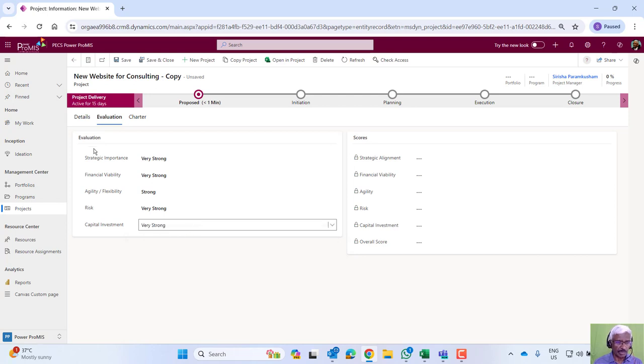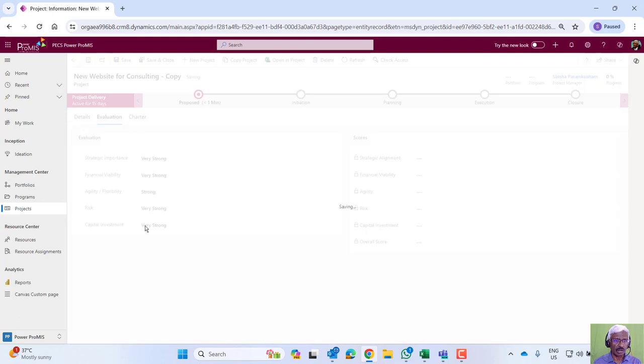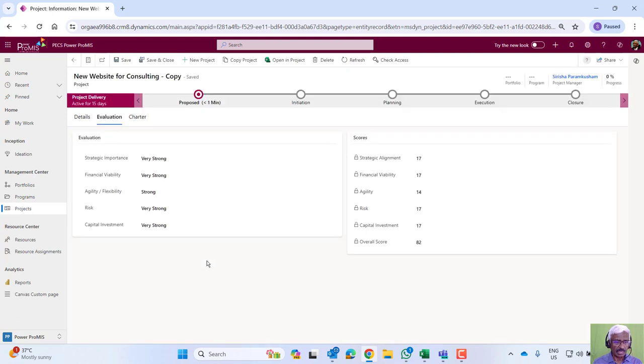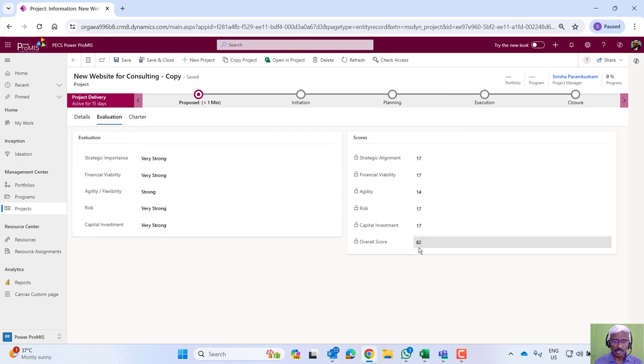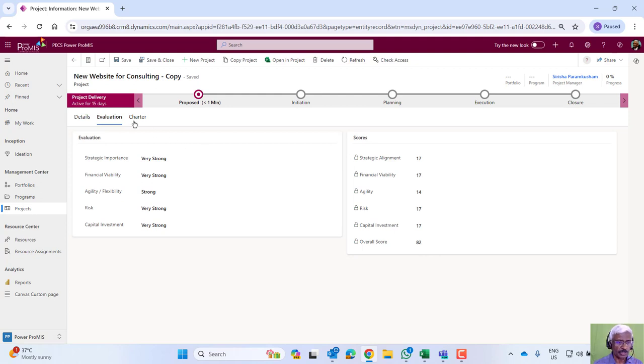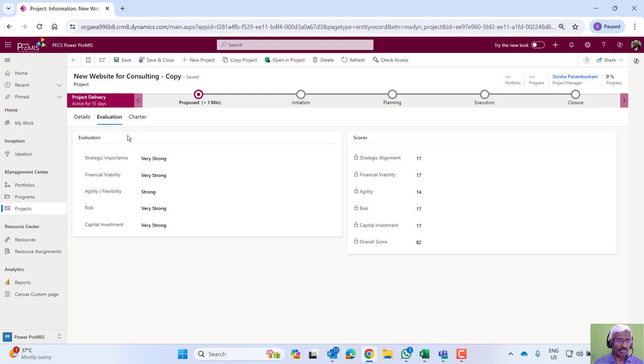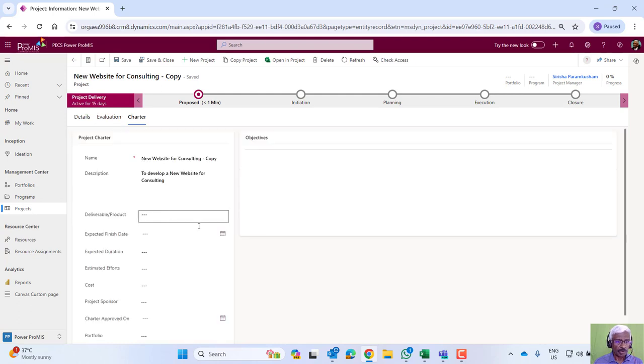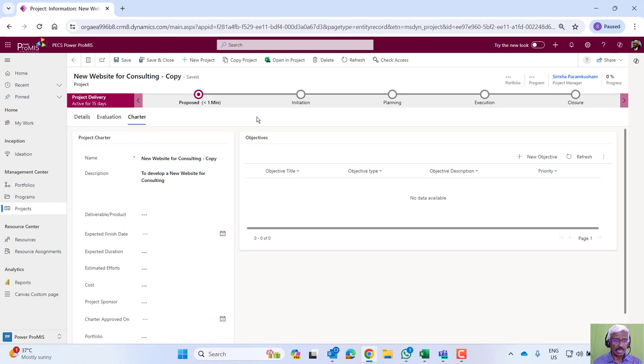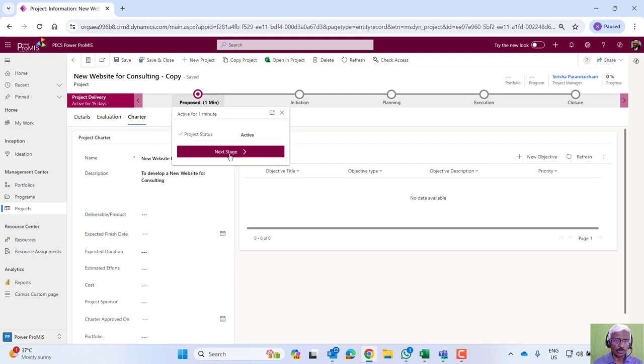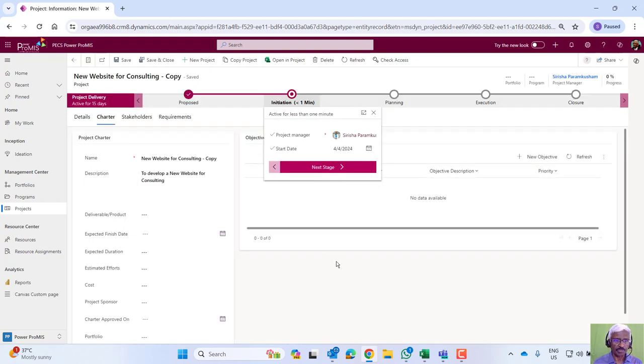And then capital investment exposure. Based on this, it calculates a score on a scale of 1 to 100. Based on these attributes, the score for this project is 82, and that can be used to approve. If it's an external driven project upon receipt of a formal contract or purchase order, we can put the preliminary charter details and then move it into an initiating stage.